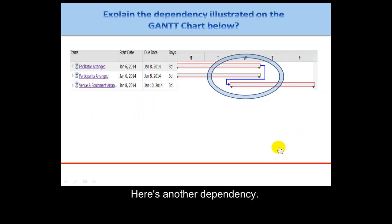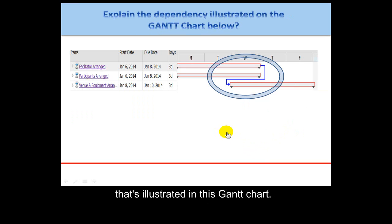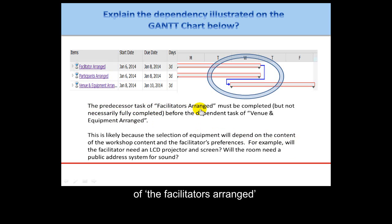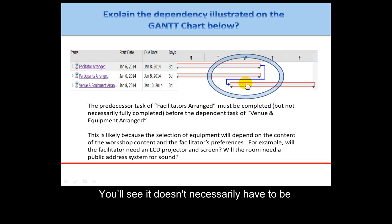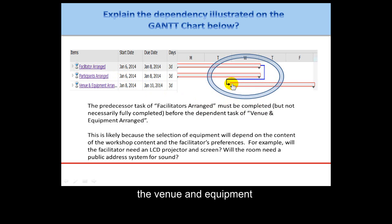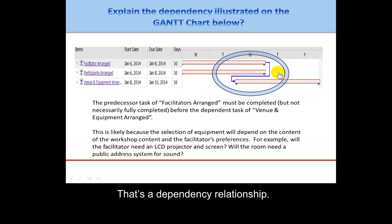Here's another dependency, and this one happens to be at the milestone level. Take a look and explain the dependency illustrated in this Gantt chart. The predecessor is the milestone 'facilitators arranged' — this must be completed, but you'll see it doesn't necessarily have to be fully finished. You can actually start arranging the venue and equipment before you're fully finished with all of the facilitator arrangements.